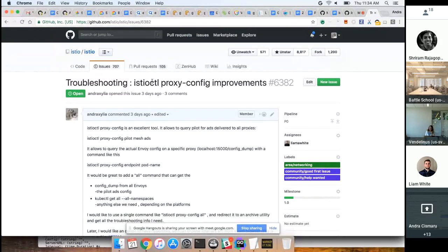Currently it's marked as P0. I don't know how it got marked as P0, but I did. I marked it. So it's clearly very important to be able to diagnose customer issues. But would we block shipping a release on this feature not being present? I'm not sure that we would. Right. So that already makes it P1, not P0. Now it can be P1 and targeted for the 1.0 milestone.